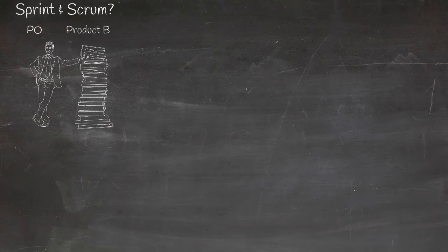Today I want to discuss a sprint in the Scrum. First of all, there is the product owner who is responsible for the product backlog. The product backlog contains all the requirements that we know at the moment. The product backlog contains just enough details for the team to understand the requirements, and is sorted so that the most valuable and ready to implement features are on the top.